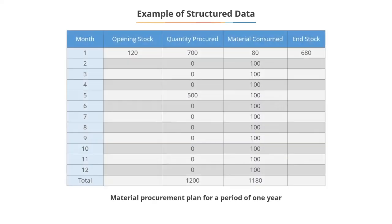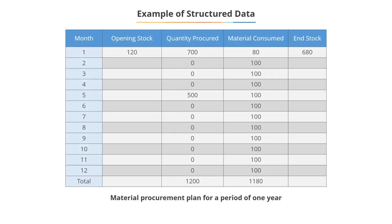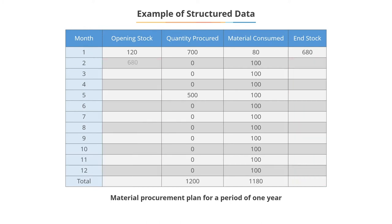Let's understand this with an example. On-screen is a material procurement plan for a certain component for a one-year period. This data is in a structured form. Using Excel, missing values can be obtained. For example, the end stock for month 1 becomes the opening stock for month 2.